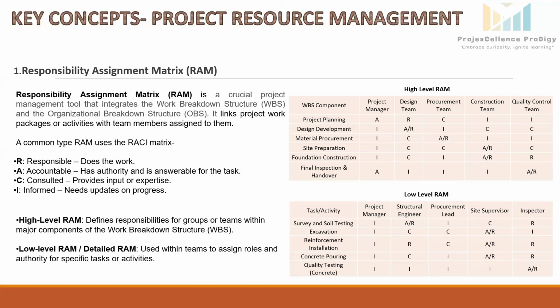In the RACI matrix, it is important to note that for any activity or task, there can be multiple individuals or groups assigned as responsible, consulted, or informed. However, there will always be one accountable, whether it is an individual or a group or team.